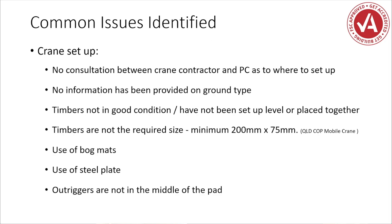For crane setup, some key things that sometimes don't happen well: consultation between the crane contractor and the principal contractor about where they're going to set up. Sometimes a crane will roll onto site and just set itself up somewhere, and when you ask the principal contractor or operator whether they were informed, the answer is sometimes no. That creates significant issues for both parties. Information provided on ground type — we might have a geotechnical engineer's report, but it's not for the actual soil area where cranes are setting up. We need to be quite specific, depending on the job, ensuring appropriate controls are in place for the scope of works.